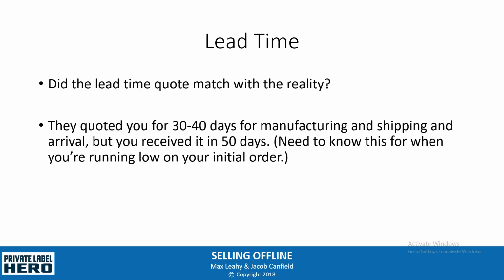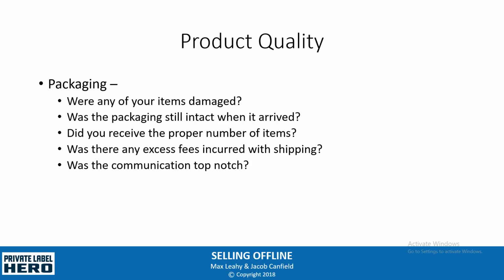So if they said it was going to take 30 days to ship to you through freight on the sea, and you get it in 50 days, a 20-day lead time is a very big difference. So you need to know this for when you're running low on your initial order, and you can also structure that into your contract when you first have them, and you make sure you use our contract template to get all of those things added in there. You can have penalties that they incur for each day that it's delayed, etc., etc.